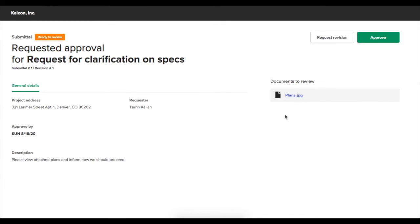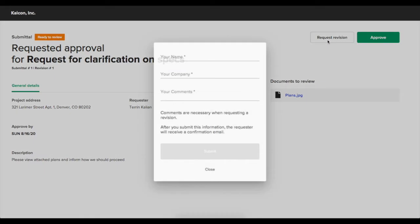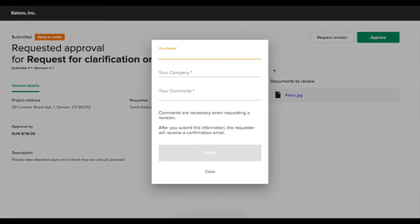And if everything looks good to them, they have the option to approve. They also have the option to request a revision, which will switch the submittal back to a draft state so you can make the adjustments and then send it back to them.